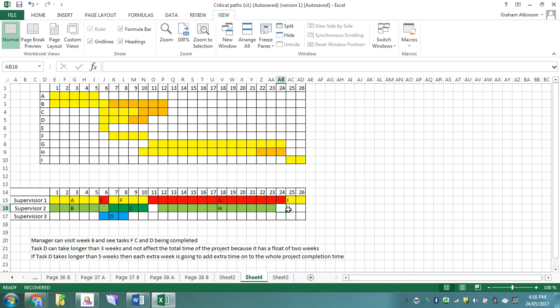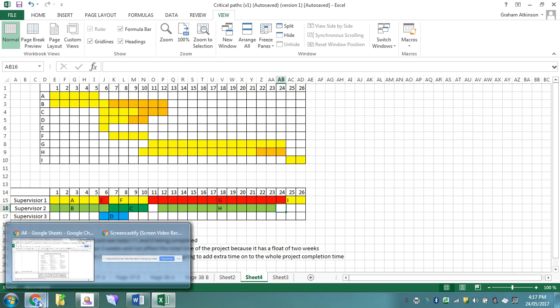And if it goes longer than that, then maybe C can't go here, and you then have to reshuffle, and then there's an extra supervisor required, because tasks E, D, and C are all being completed at roughly the same time, and you can't get away from that. Okay, they will all concertina at some point. So it's that kind of discussion that you've got to be aware of. So that's the sort of discussion that you're going to have for excellence.